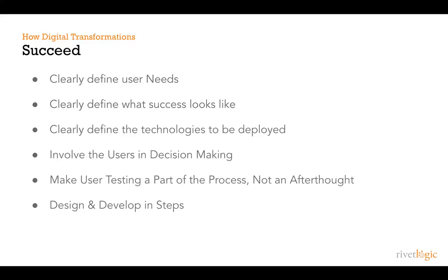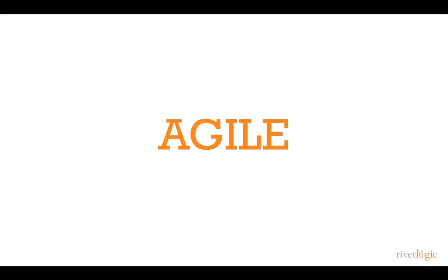And we iterate around to bring new developments, new findings and new ideas in at any stage in the process. Now, for developers, this step-by-step process is the agile methodology, which makes use of development sprints. Generally two weeks of intense development on a single item, a single idea, or a single feature or functionality within the product being created.